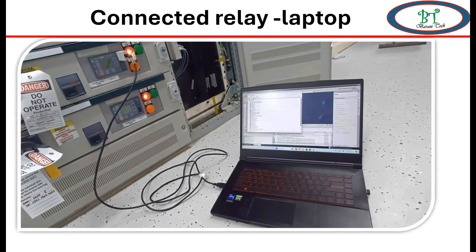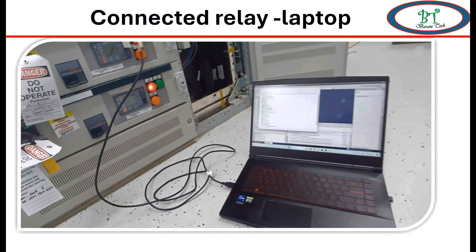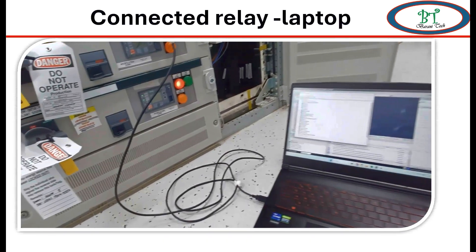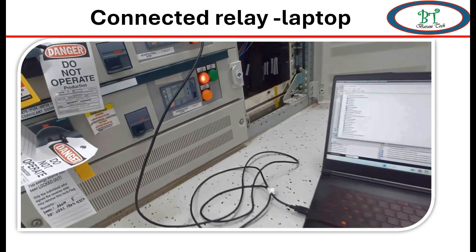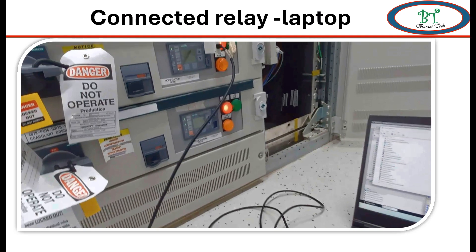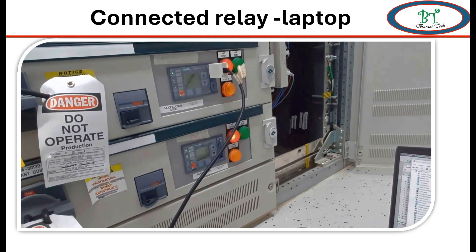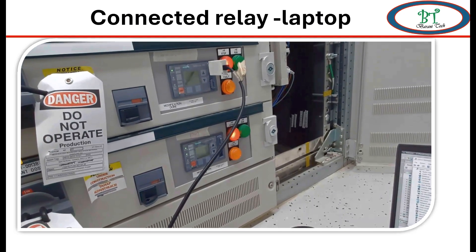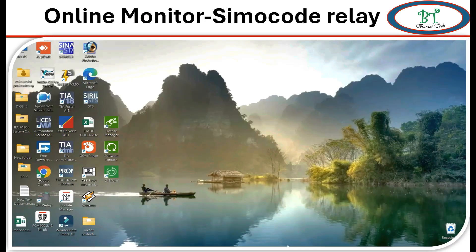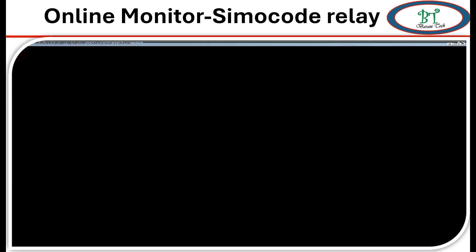If the module is in service position, the simulation will not work, so put the module in test position while doing this test simulation. Now open the software and connect with the relay.